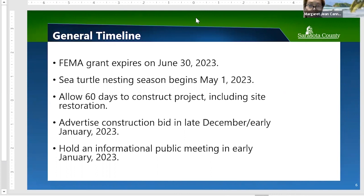Which projects are being referred to? The Midnight Pass resurfacing project is in the northern part of the island, and the roundabout won't start construction until December of next year. The hotel projects are still in litigation and haven't submitted paperwork to the planning department. We're going to be in and out by end of April — maybe a couple of weeks in May finishing up, possibly repaving if a dump truck chews up some asphalt.